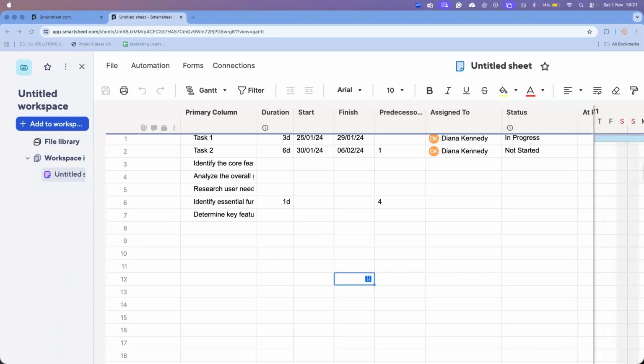And we can configure the testing sandbox for a new EMR and begin procurement of key infrastructure components like firewalls, switches, and the like. We're just beginning the procurement phase of the project. The decisions and support needed are final sign-off on the EMR enhancement scope from the clinical lead, budget release approval for phase 1 procurement, and confirmation of weekend access windows for infrastructure deployment.